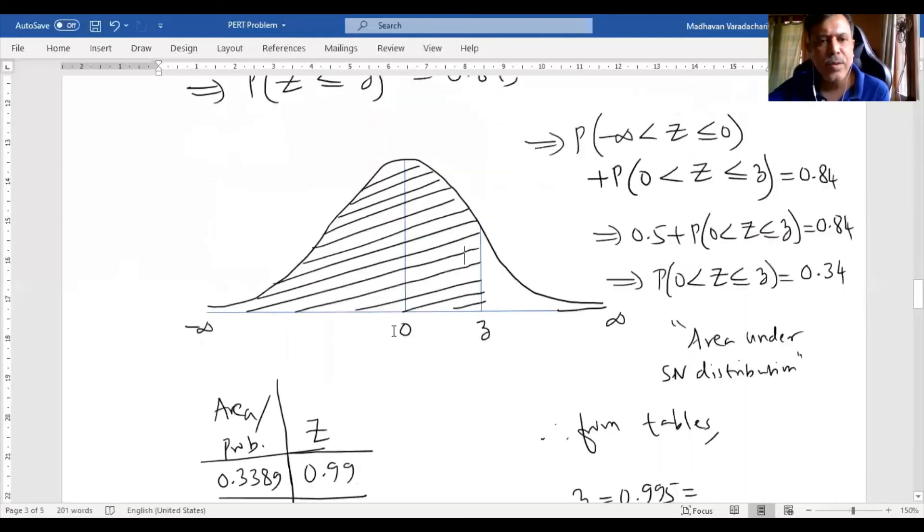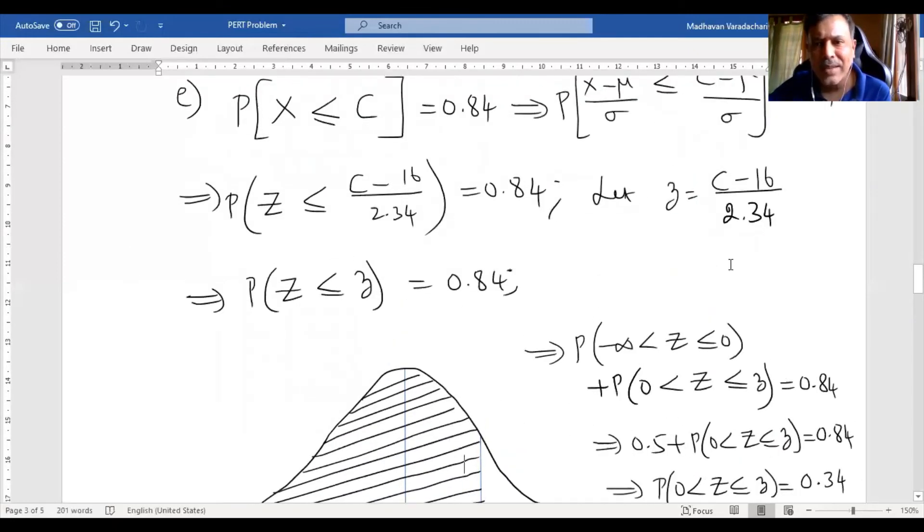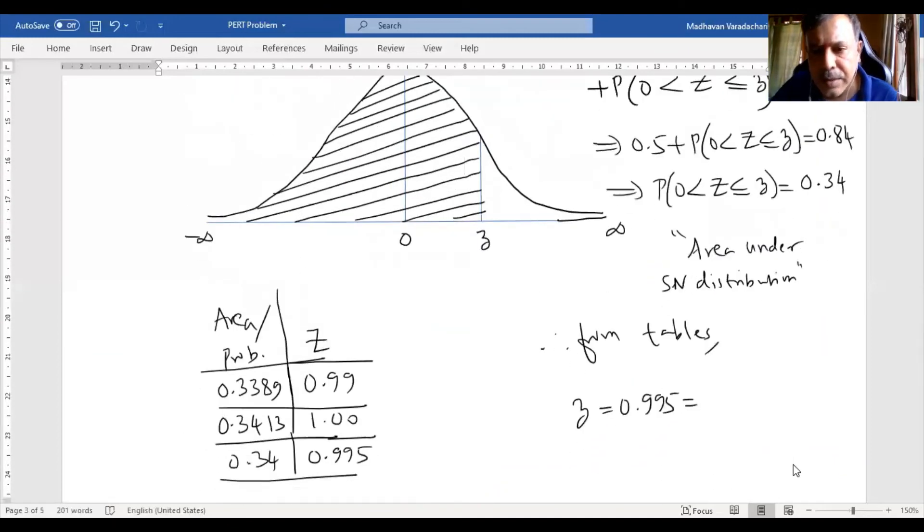Let us go back. What is our z? We assumed z as C minus 16 by 2.34. By doing cross multiplication, 0.995 times 2.34 plus 16 gives us 18.33 weeks. If the probability is 0.84, then the actual duration to complete the project can be 18.33 weeks.